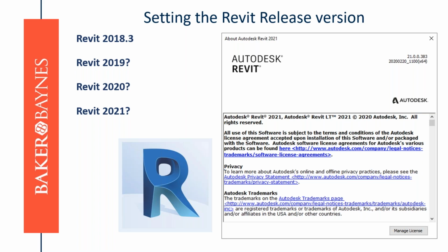This determination is especially important for a cloud project, since the first Revit module initialized to this cloud project sets the Revit version for the project. So the project admin would be well advised to initiate one module to the project early on to set the Revit version to be used. This can be a model for the project or a temporary model which can be deleted later. Therefore, it's advised that you stick to your version and make sure that everyone is on the latest service pack.